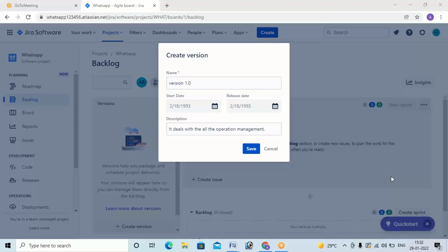Yeah. So once it has been executed properly and the client is satisfied, the client is going to sign the project closure document. And all documents are going to be handed over to the client. Then finally, you arrange a session with the business stakeholders, and a number of people are going to attend that meeting. So it's a release kind of meeting, a final meeting. Yes.